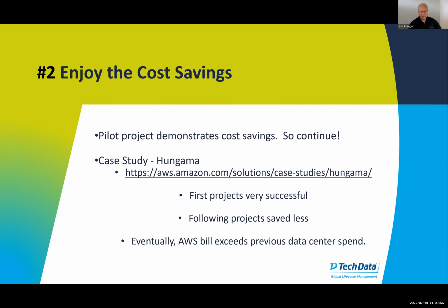So what happens to some organizations is this: there'll be a pilot project. A crack team is basically assembled to migrate one low-risk application into a cloud environment. They are very successful at it. They do a presentation at an all-hands meeting, and they show how much money they saved and they're going to save over time. Everybody claps. They get a plaque from the CEO or CTO, and we decide to keep doing the same thing. But the problem is the subsequent migrations are much more difficult, okay?